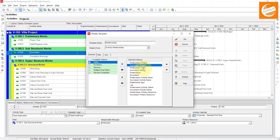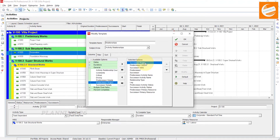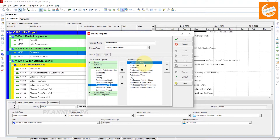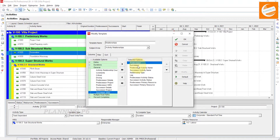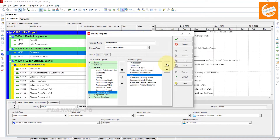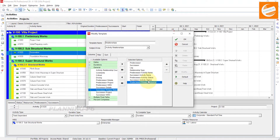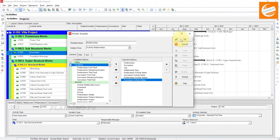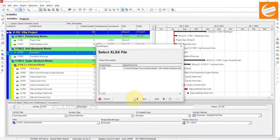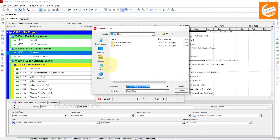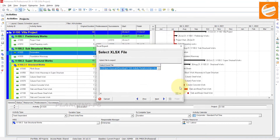Here we will add a new template named 'Activity Relationships'. The columns required are: successor project, predecessor project — you don't need those two if not required — predecessor activity name, successor activity name, relationship type, lag, and activity status. Move those columns upward and then click Apply.